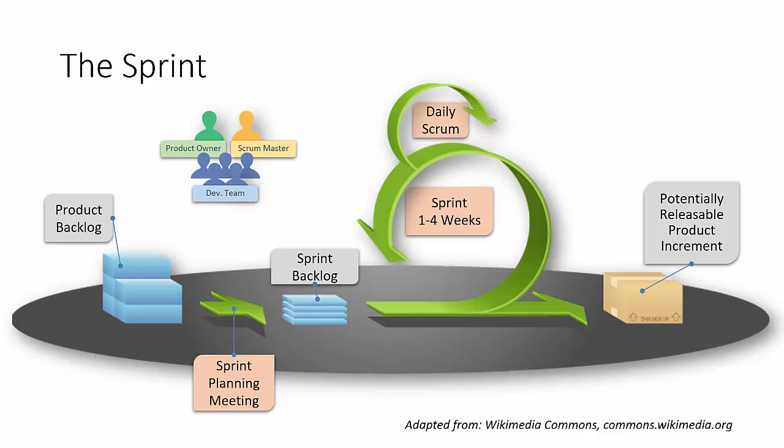And this daily scrum holds the pulse of the sprint, essentially. Towards the end of the sprint, we reach the sprint review meeting, together with the customer. It is the meeting in which the Scrum team presents the product increment to the customer and delivers the results.